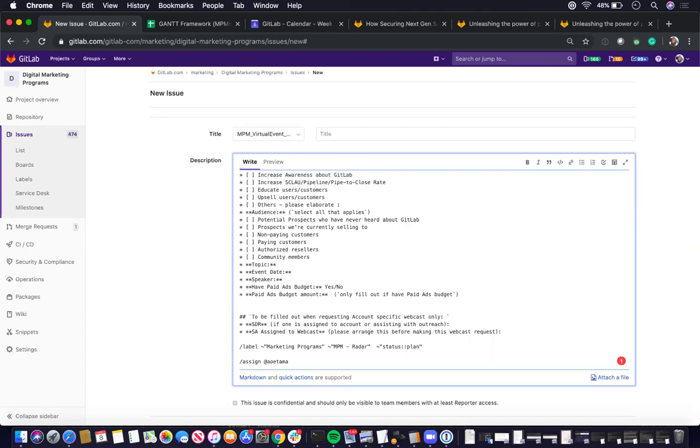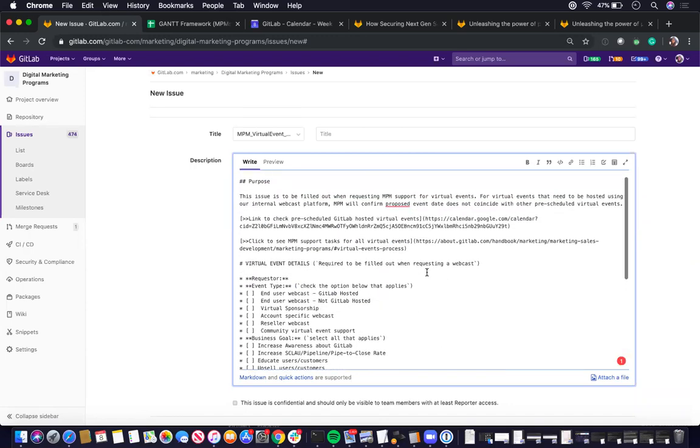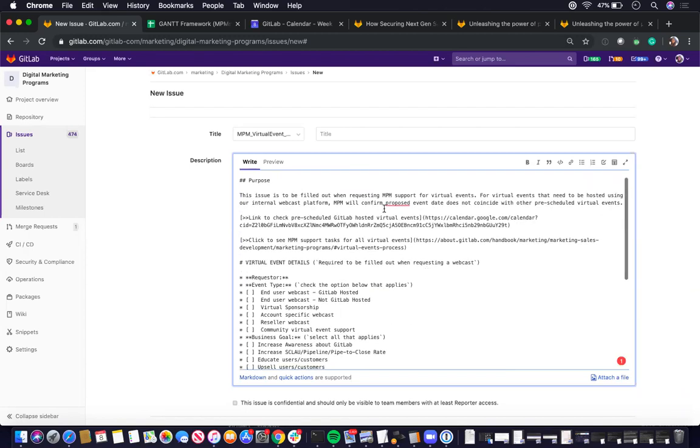The default status when someone submits this issue template will be status plan. So what you want to do is they're supposed to mention you to confirm if the requested date is feasible.